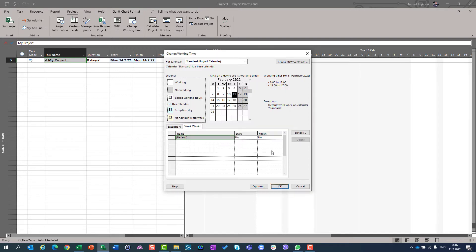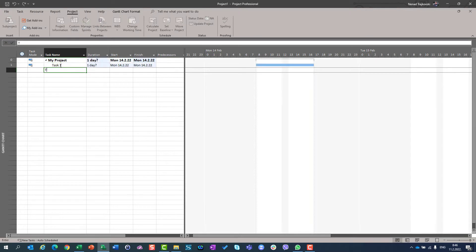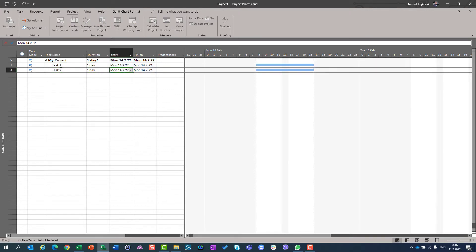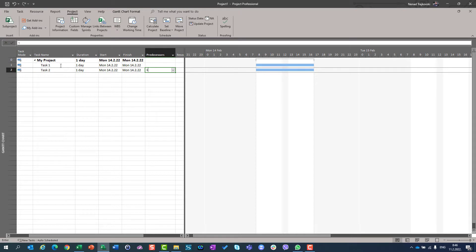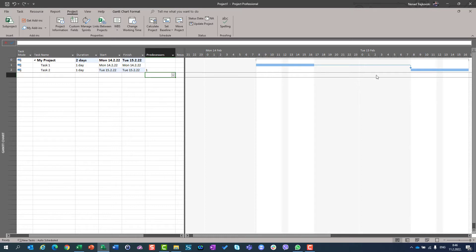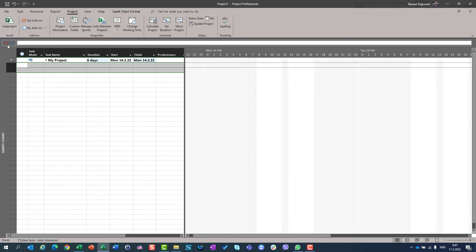And everything is great. Now, if I put Task 1 and Task 2, and both of them are one day duration, and they have finished to start a relationship, then the first task will start at 8 and will be finished at 4pm. And the second will start next day from 8 to 4pm. Now, let me show you something new.